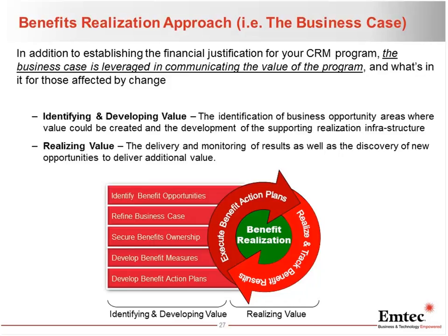Yeah, there's a couple of really important benefits to doing this at this particular point in the program and doing it right. As John mentioned, one thing is to make sure that when you do the business case, you are incorporating the right level of OCM. We went through the approach earlier on the OCM roadmap that established the right level of effort, the right team structure that has a cost to it, and that cost should be integrated into the business case, right? So the cost of the program.